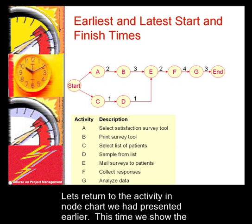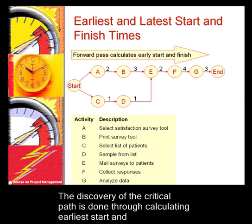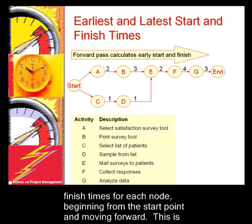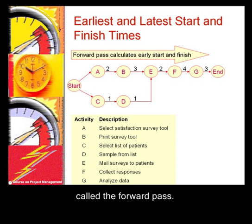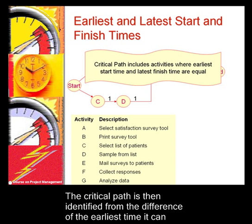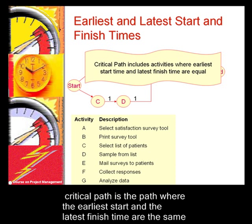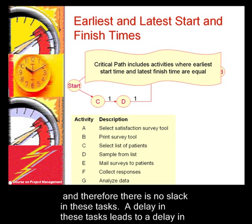Returning to the activity-on-node chart, this time we show the duration of each activity on the arrows from each node. The discovery of the critical path is done through calculating earliest start and finish times from each node, beginning from the start point and moving forward — this is called the forward pass. The backward pass calculates latest start and finish times for each activity. The critical path is identified from the difference between the earliest time a task can start and the latest time it can finish; this difference is called slack time. The critical path is the path where the earliest start and the latest finish time are the same, meaning there is no slack. A delay in these tasks leads to a delay in the entire project.